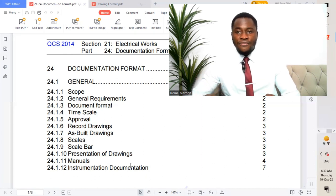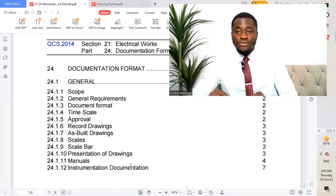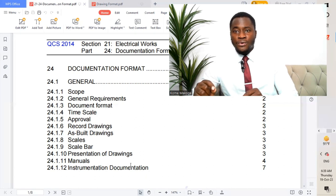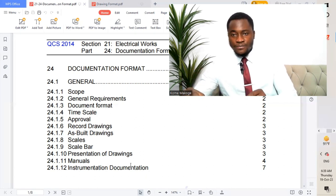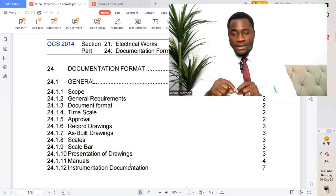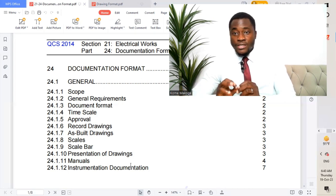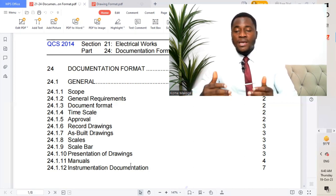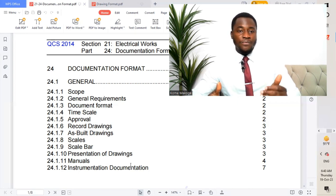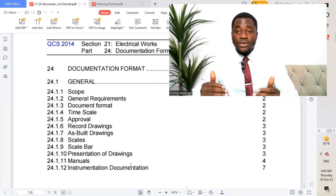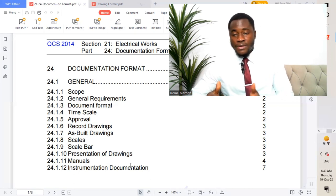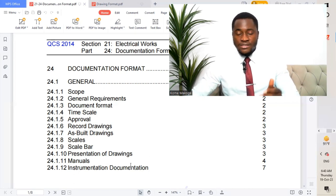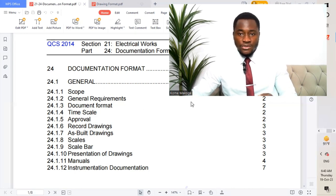After the project is done, we submit another set of drawings to the client called as-built drawings — the drawings submitted to the client for handover. All these different steps are very important. The code, KCS 2014 Section 21 Part 24, document format, gives us a highlight of all the different procedures and formats to be used in execution of the project.